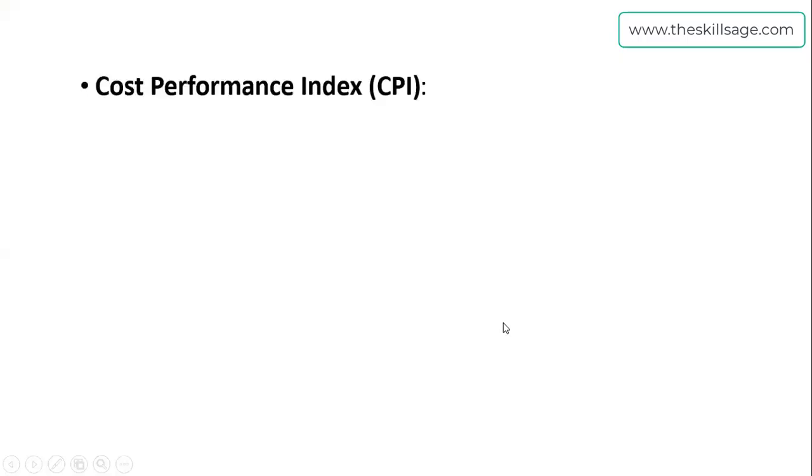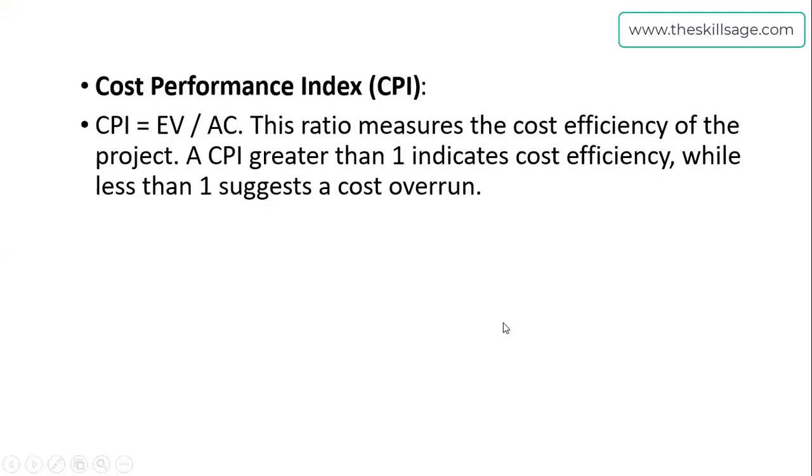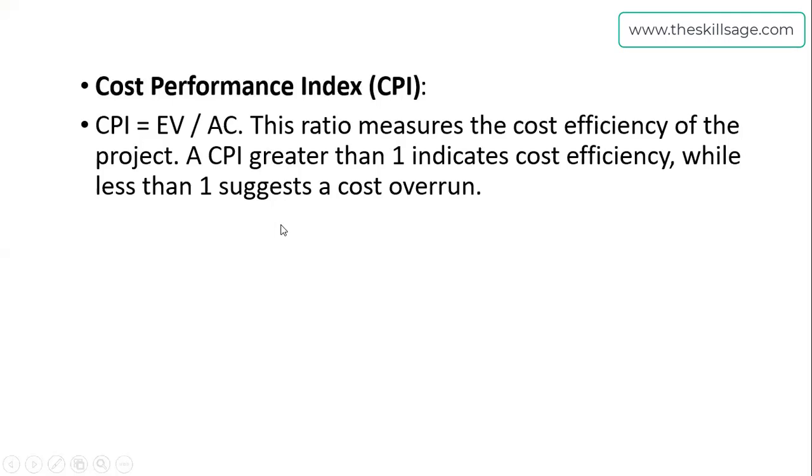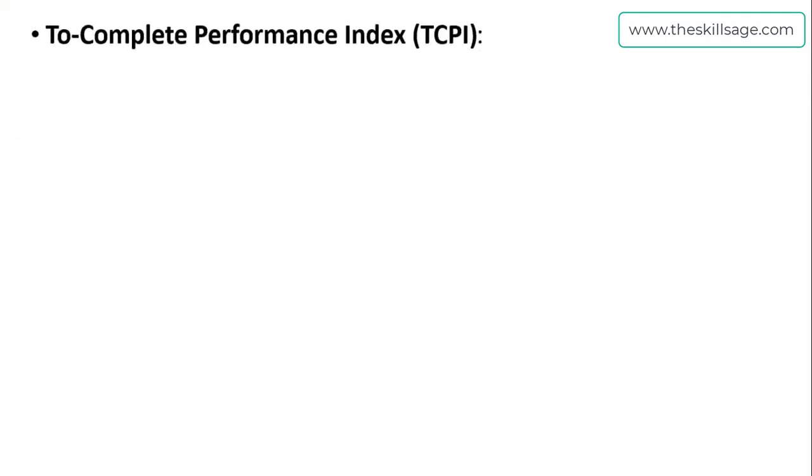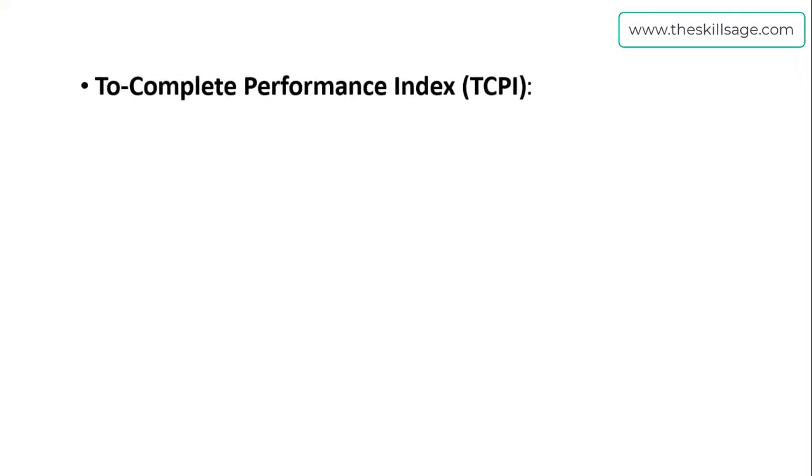Next is CPI—it's the measurement for our cost ratio. Cost variance was earned value minus actual cost. Now there is a division to memorize in an easy way. It's a ratio to measure cost efficiency of the project. Same way you can understand the concept of one. You can visualize and discuss in meetings. If your project has a CPI of 1.27, that's good. If it's 0.95, that's not good. You can write down in comments why. I'm leaving something up to you.